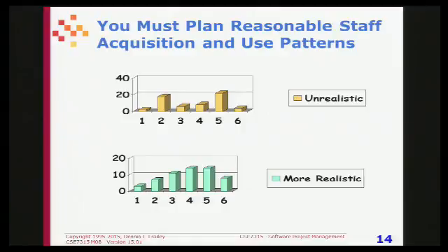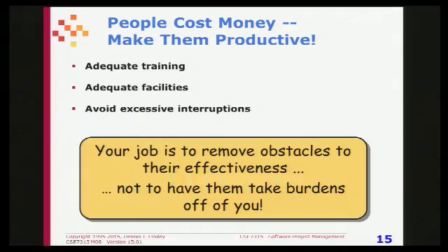I remember one time when a company was making a proposal where they had nobody in month 1, they had 52 people in month 2, 53 people in month 3, and they were down to 5 people in month 4. And our question was, where the heck are you going to get all those people to come to work for you for only 2 months? It just didn't make a whole lot of sense. People cost money.